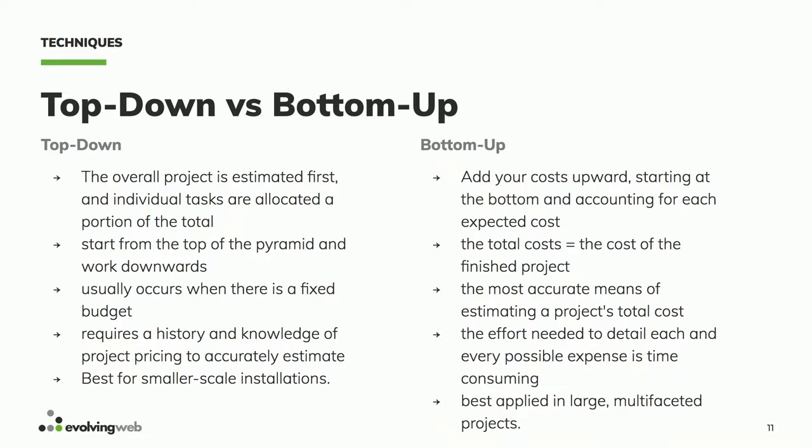And then, of course, you're going to start breaking things down, the development, which is, in my intuition, for Drupal projects, about 60 to 70% of the budget goes to that. But in some projects, especially design-oriented ones, it may be lower. But you're going to break that up into sprints. You're going to break it up into phases. And you're going to say, well, in this phase, we're going to tackle these things. And we think this phase should have three sprints of 2 weeks each. And the deliverables in the first sprint will be this, the second sprint will be this, the third sprint will be this. And then you account for the QA, documentation, demos, project management that go into every sprint. So that's more the bottom-up approach.